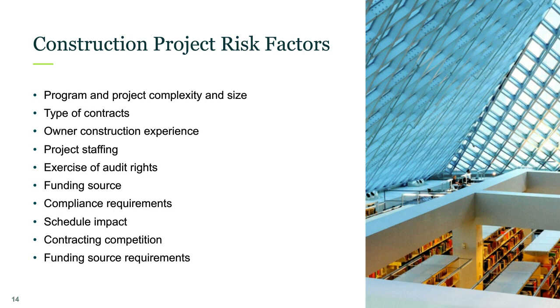Exercise of audit rights. If your contract does not have this, you need to work with your contracting and/or legal department to get this included in your contract. This is a big area where you can get cost information to ensure that you're not getting overcharged.